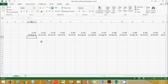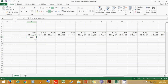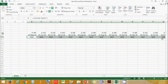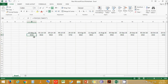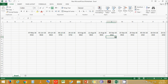First thing we do is convert the date into a month format. We use the TEXT function: TEXT(value, "MMM-YY") — month and year format — and close the bracket. Now let's stretch this. We have converted the date into month format. 1st June is now 6.16, 20th June is 6.16 again, July is 7.16, and 24th July is 7.16 and so on.